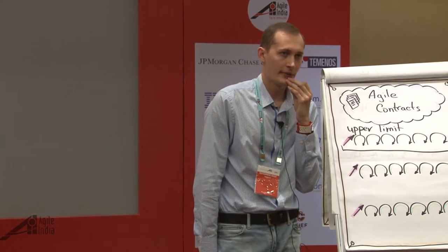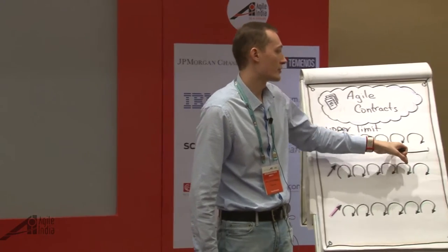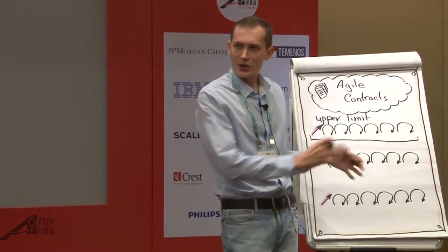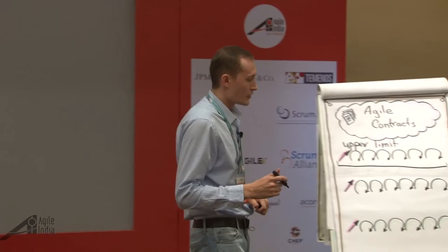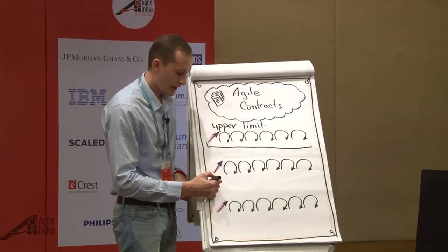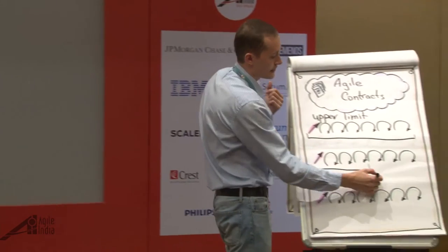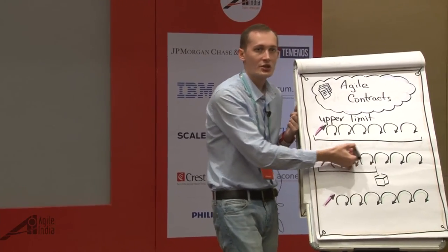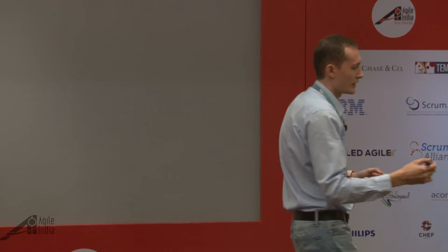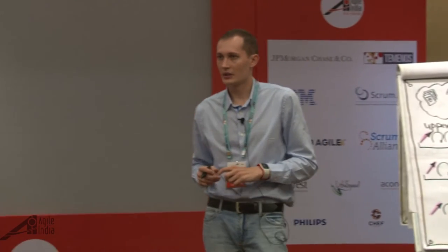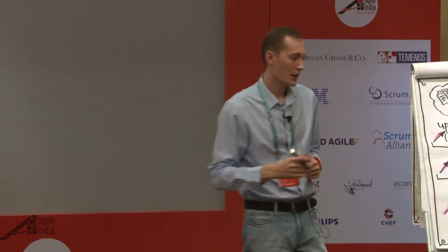But that doesn't work as well if you're in a very uncertain domain where you're not sure if you'll deliver something valuable by the end. So there's iterative contracts — we're not going to give you the full amount, but let's try a little experiment. Run for three sprints. At the end we already have some sort of product and collected historical information about how fast we're going. Then if everything's going well, draw another contract for another piece of work.